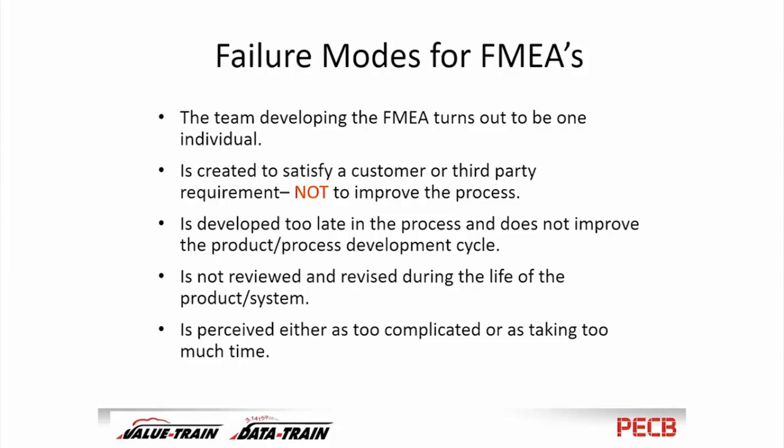So one failure is that instead of assigning a team to do it, you give it to one person. And if the company doesn't care about this, or they're just cavalier about it, they may even give it to an intern, to a college student who's working there for the summer. It says, here, we need to do this, and everybody else is busy, you do it. So this poor kid has to do this all by himself, and he's not going to do a good job because he doesn't know enough.